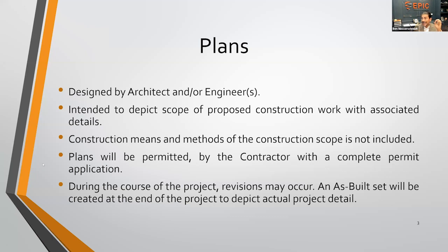But at the end of it, an as-built set will be created at the end of the project, usually by the contractor, to depict the actual detail. So there will be a set out there, so you'll know what was actually done and how it was actually done, both for the community's records as well as the municipality's records.